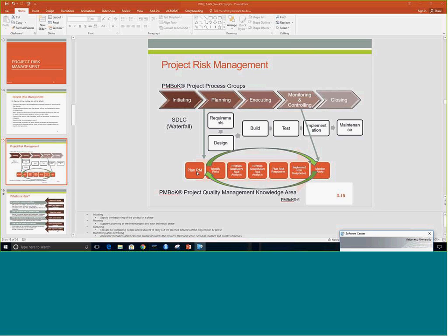Remember, again, you cannot manage what you don't know. So it's really important to identify your risks and figure out how bad their impact could be. Also, what the potential is for that impact to arise, right? So you have two components here. You have the impact and you have the probability for risk. And both together, probability and impact measurements, really allow you to quantify your risk.